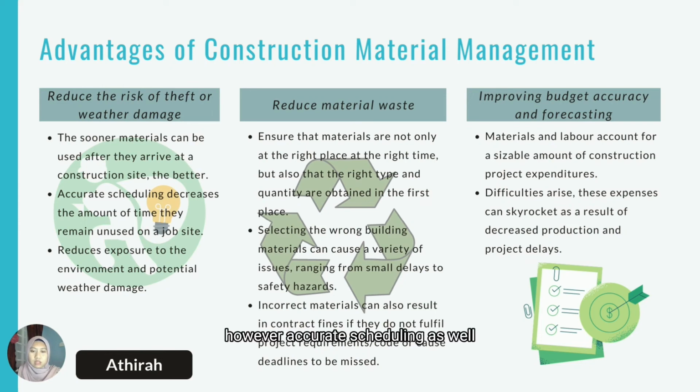Accurate scheduling as well as acquiring the correct number of building materials decrease the amount of time they remain unused on a job site, and this will reduce the exposure to the environment and potential weather damage as well as their vulnerability to theft.